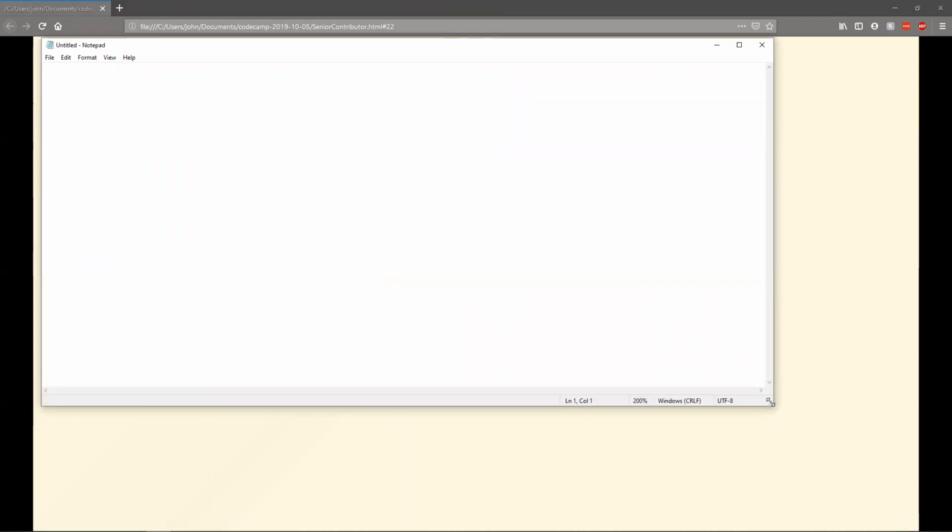One of the problems I have with retrospectives is that nobody likes to prepare for them, right? Frankly, you have a lot of other stuff pressuring you to get done. So I started asking myself, what is the minimum amount of preparation that actually creates value from a retrospective? Based on other teams I've worked on, I created a very simple frame that I use when I go to meetings. First of all, whoever is one of the fastest typers, you have that person at the keyboard doing the presentation. Then you have just a few headings that get filled in. And if someone's out of order, you ask them to bring it into order.